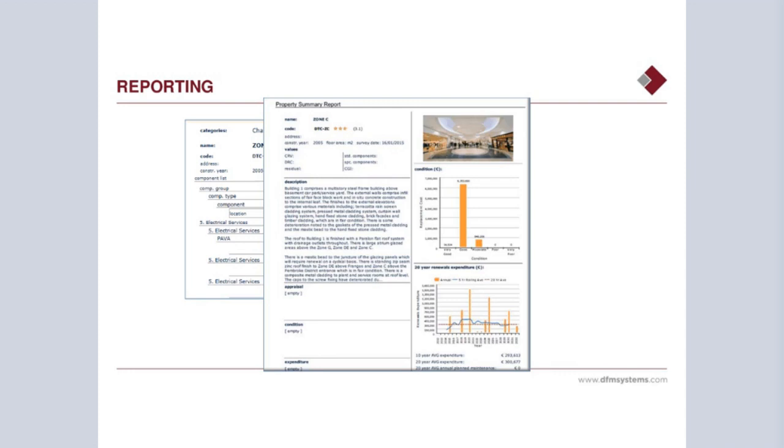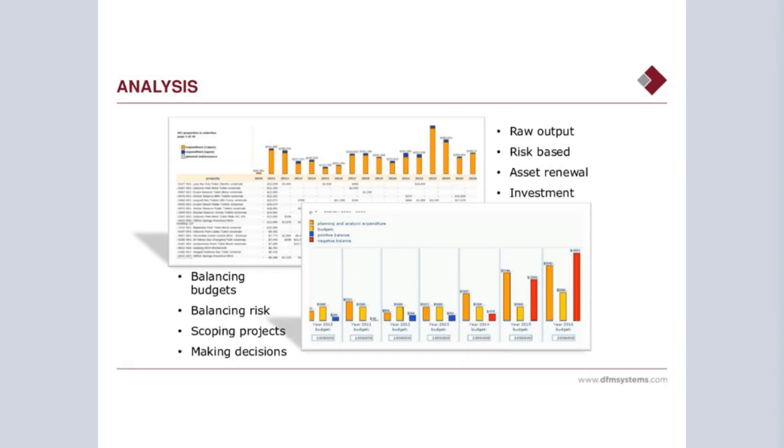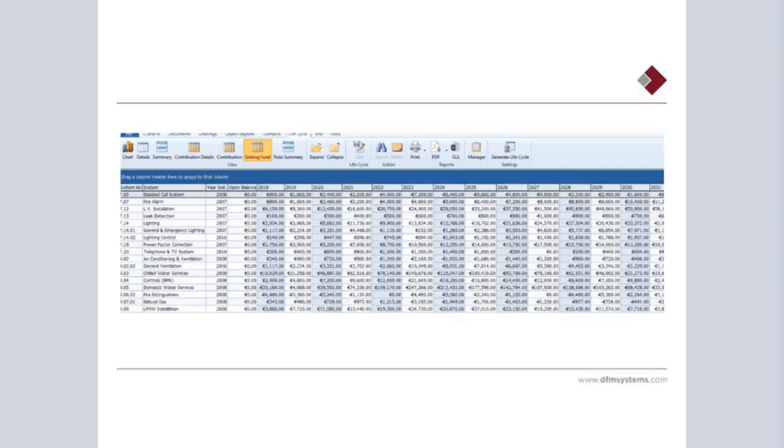Lifecycle asset management, I mentioned earlier, is the ability to create 20-25-year predictions in terms of what equipment and what costs are associated with replacement equipment over the next 10 or 20 years. And on some projects, we're actually producing a sinking fund cost analysis on the project while it's still in construction.